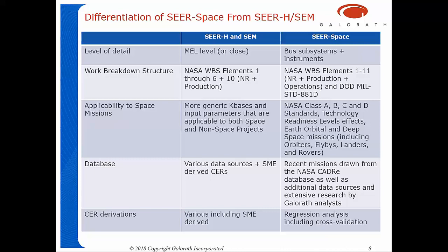SEER Space is based on recent missions drawn from the NASA CADRE database, as well as some additional data sources that we have internal to Galorath, and then a lot of extensive research by Galorath on the NASA CADRE data points. As an example of that, those of you who are users of the NASA CADRE may have noticed that a lot of projects don't divide the cost between non-recurring and recurring because NASA usually builds one-off kind of missions. So we've had to go and do research into how to divide the cost between non-recurring and the production cost because we wanted to develop a CER and we wanted a production CER separately. So we've done over a year's worth of research and untangling that sort of stuff that's behind the scenes in this model.